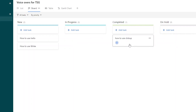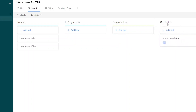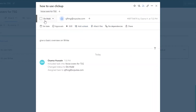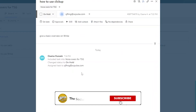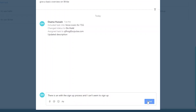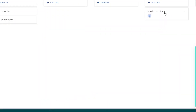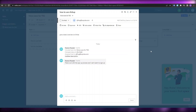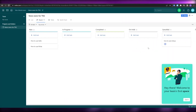If there's some sort of hiccup with a task, they can move it to the 'On Hold' board and try to solve the problem. They can add a subtask, an attachment, or a comment — for example, 'There is an issue with the sign up process and I can't seem to sign up.' The project manager or person in charge will look at it and try to solve it. If it can't be resolved they can move it to 'Cancelled'.